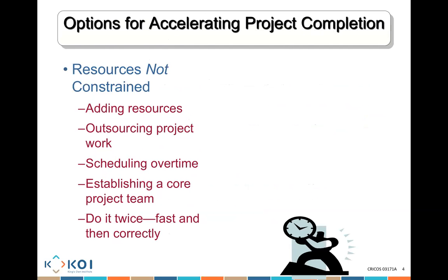Now this slide is one that is important. Sometimes I ask questions in an exam relying on this slide. I say, what are the options for me to finish the project quicker? How can I accelerate the project? Well, there's two things you can do. If your resources are not constrained, if you can add more people to work on your project, then an easy way to do this is to add more resources.